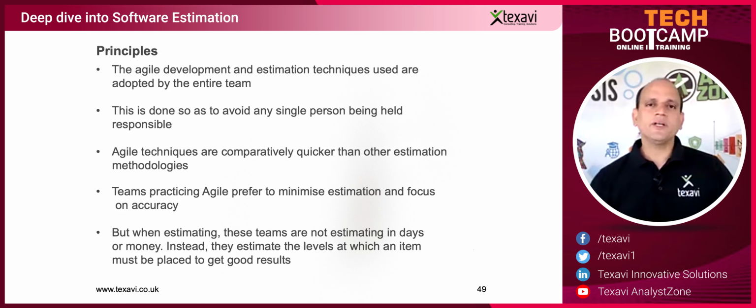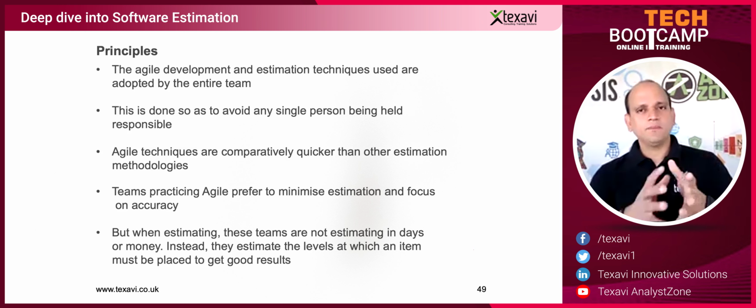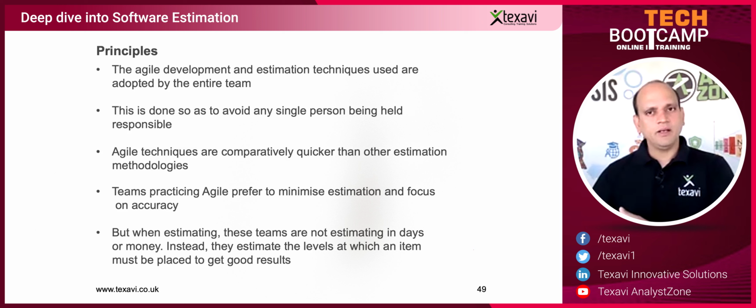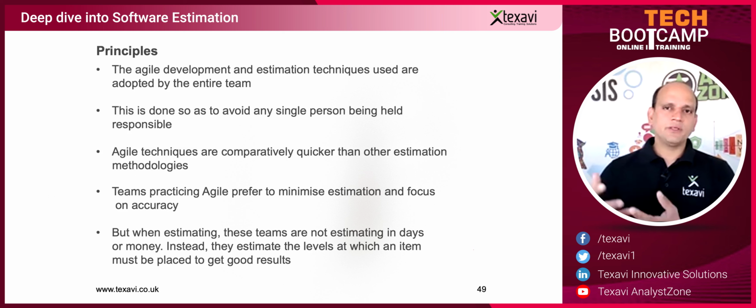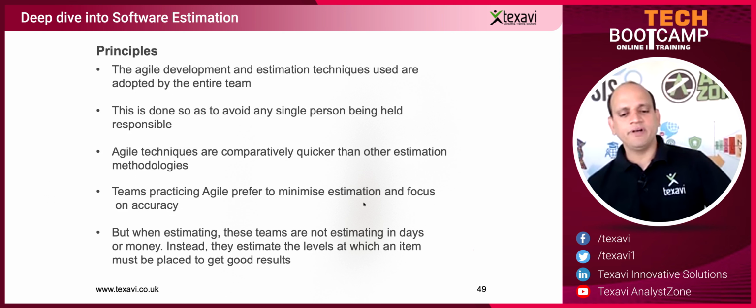So it's important we start off with the fundamental rule. The size gives you the proper number. And from the size, you can then look at the productivity and come up with the effort. From the effort and the number of resources, you come up with the schedule. From the schedule and the number of resources, you come up with the cost. This is the basic foundation for estimation.